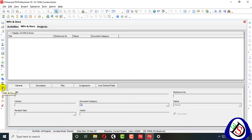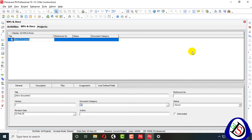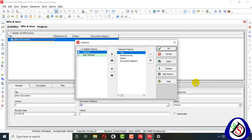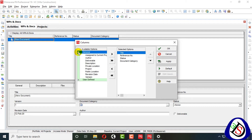When I open Work Products and Documents, a window will be displayed in front of you. I will add from the Insert button — that's the easy button. I add a document; you can see a new document has been added here. You can go for the columns — there is a default column and you can customize your columns. From General, you can assign the author of the document.